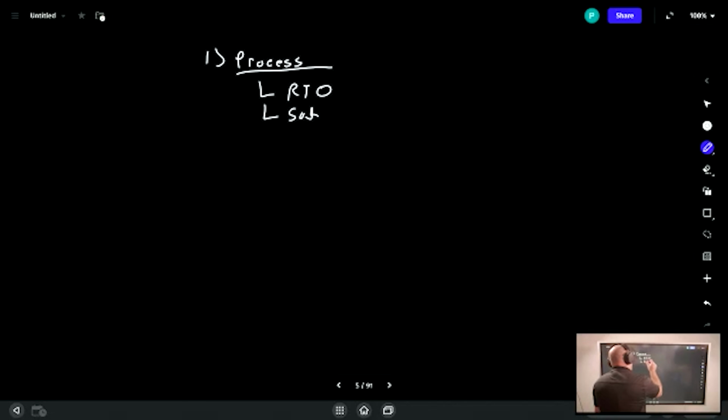We're going to have our submittal process. Our submittal process is going to be largely driven by the specification, but the submittal is the most important part outside of the release to operations, because the submittal usually is the phase gate. So it's the blocking gate at which point, once you've completed the submittal and got it approved, then you're able to bill, you're able to order material, and you're able to start execution. On most projects, you will not be able to do billings, you will not be able to do execution or material orders until you have approved submittals.